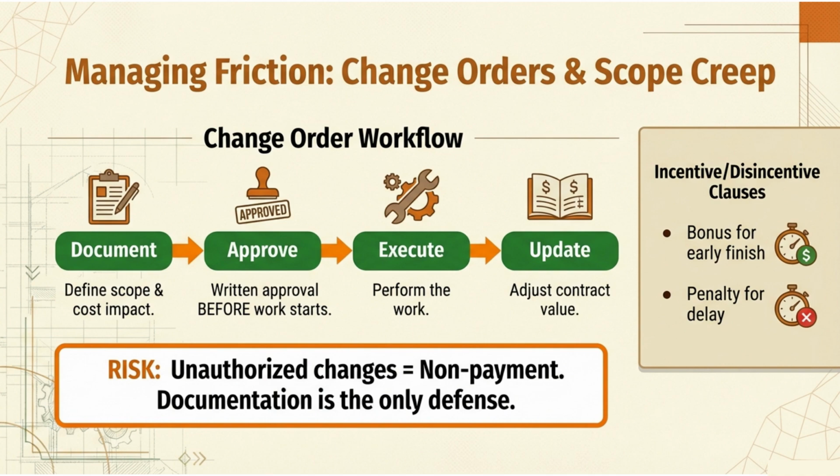Step 2. Approve. Written approval before work starts. Not during, not after. Before. Notice the big red "Approved" stamp? That's what you need. If you start work without approval, congratulations, you're working for free.